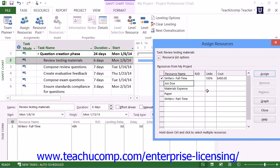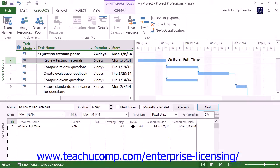When you've finished making your work assignments, click the Close button. You should then be able to see your resource assignment information for the selected task within the task form at the bottom of the window. Note that you can also assign work resources to selected tasks by simply using the task form split view shown within the Gantt chart view.